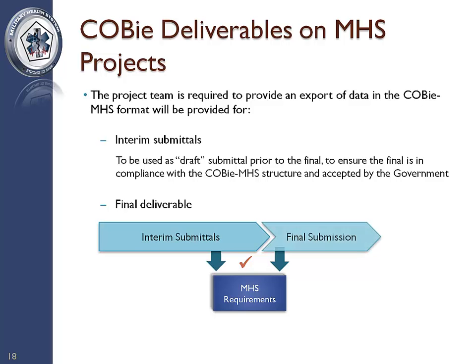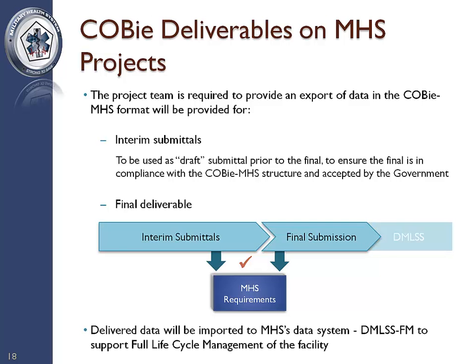The final set of data will be delivered at the building occupancy date, or BOD, and will be included with the final project dataset. The delivered data will be imported to the MHS's Facility Management System, DIMLS-FM, to support the full lifecycle management of the facility.